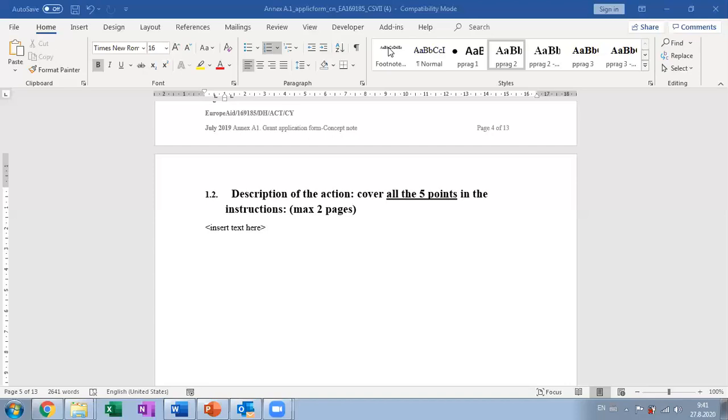But if I understood you correctly, my understanding is that you're asking who's going to be the printing service. You don't have to mention this now in the concept note at all, because the concept note is only to present your main intentions and your main activities within the project. And you don't really need to estimate the date of publication, to say it will be published on 27 August 2020, but you can say, for example, that you're planning to spend 5 months on preparation of these documents, and that they will be published tentatively in month 6 or month 8 of the project, and so on.